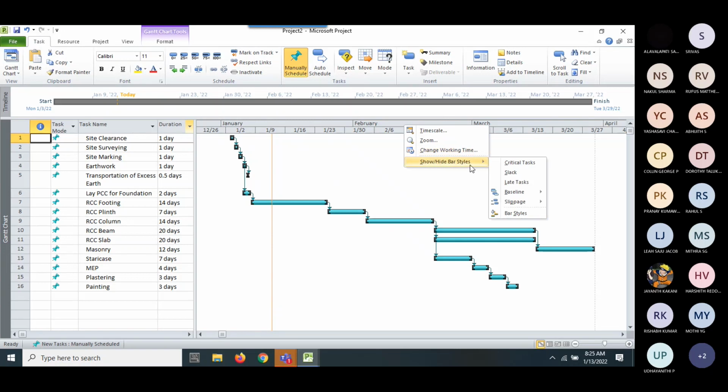This is very important. First thing is critical tasks. So I'm going to click that. So in no time, it calculates the critical path. If you have taken my operations research course, finding a critical path, solving a network diagram will be very difficult. Given 16 activities like this, it pretty much takes an hour or something like that. You need to do a forward pass, you need to find a backward pass, and you need to find early start, late start, and so on, right? So many times like activity times and event times. So it just clicks in, just a matter of a second, right?